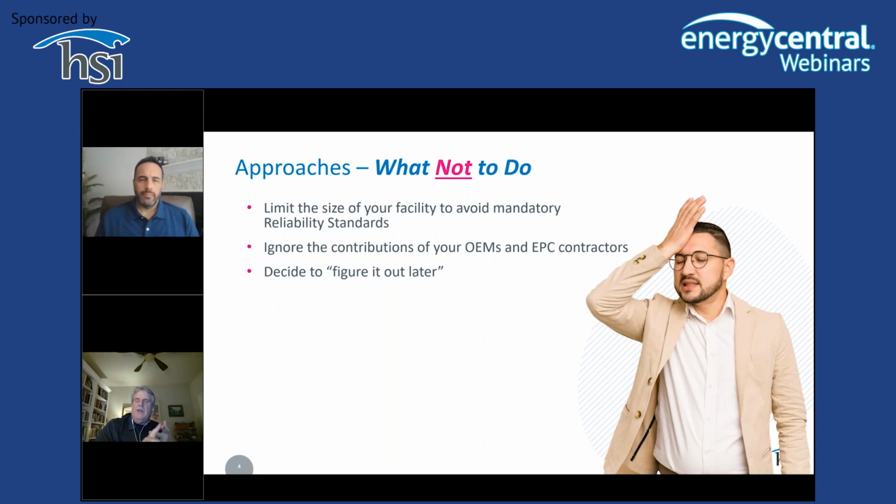For a new facility coming online, you need to be compliant on day one. That's not the day that you start looking at compliance issues and getting your procedures and processes in place. It's the day you're done. Get that ahead early, get it done early. One of the things that's going to happen after you first start up is you're probably going to get audited within the next year or so.